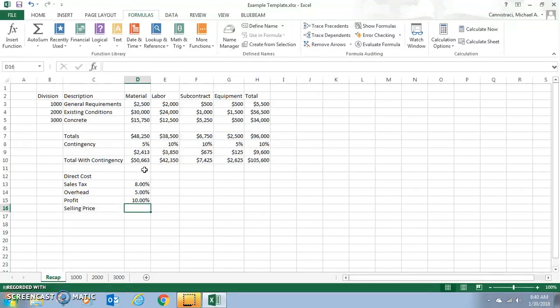If you're just a small company and all of a sudden you get a super job, you're working on some chip fab plant, and now you have to do BIM coordination, you might not have anyone on staff that can run BIM software, so you'll have to hire a consultant or pay a fee to the GC if they offer the services to coordinate for you, if it's in your contract.